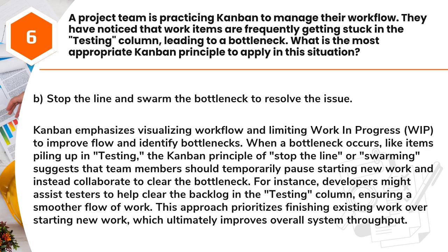For instance, developers might assist testers to help clear the backlog in the testing column, ensuring a smoother flow of work. This approach prioritizes finishing existing work over starting new work, which ultimately improves overall system throughput.